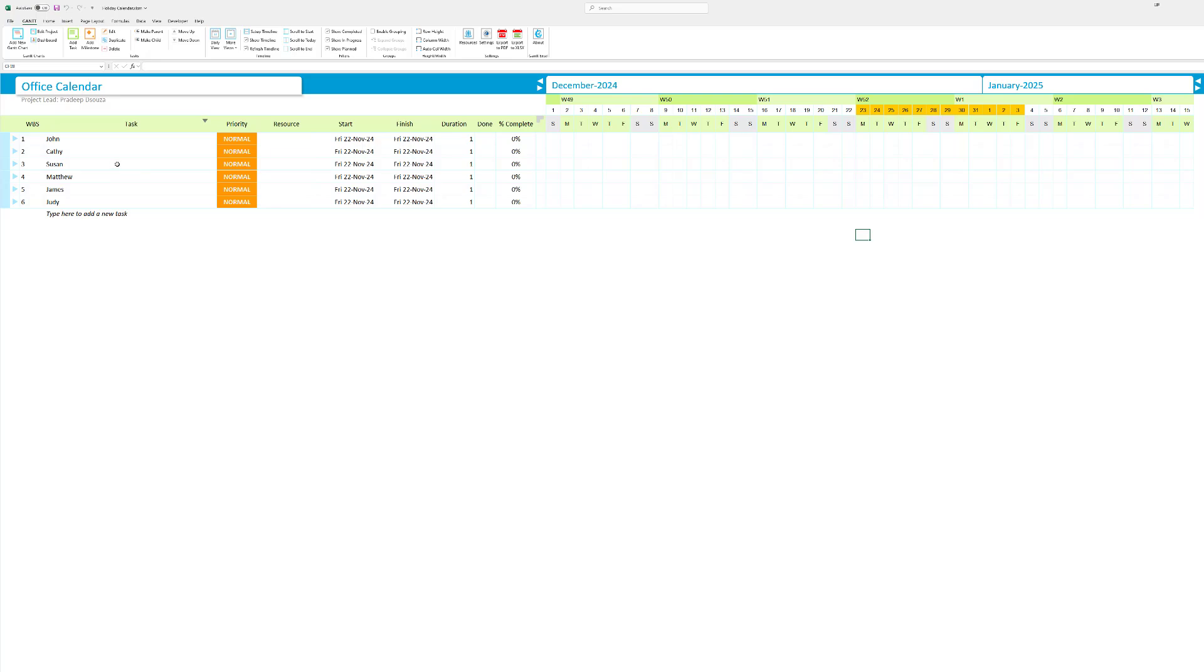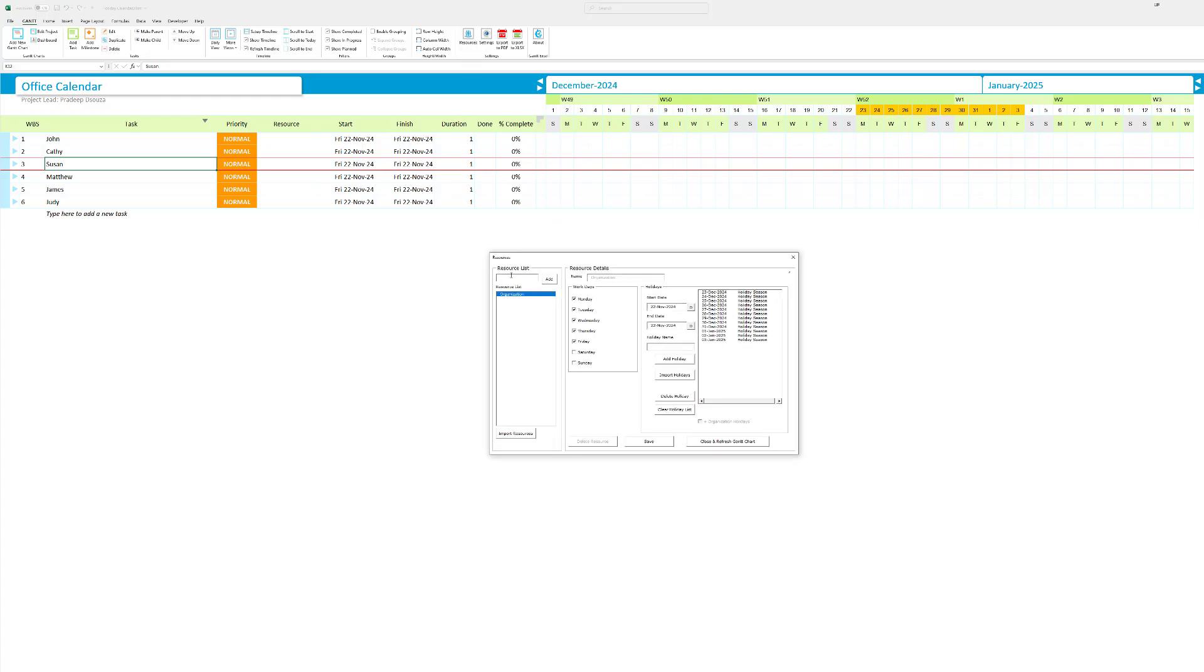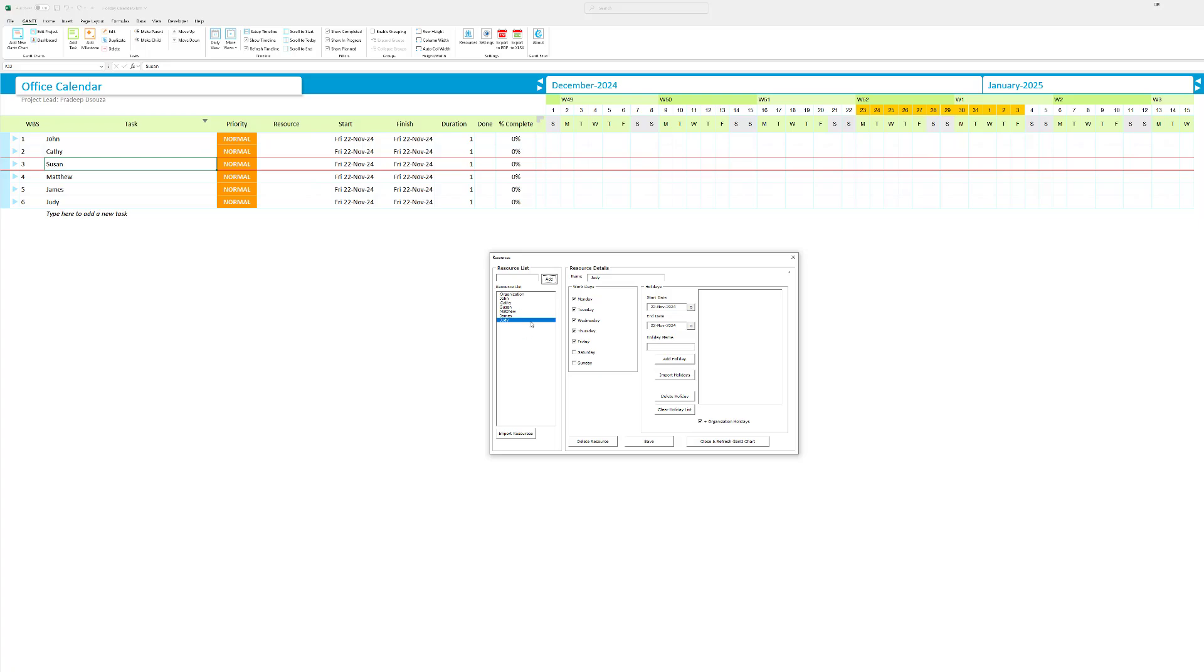Now let's add resource wise holidays. To do that I'm going to go to resources again and I'm going to add in all the resources. So I'm adding all the resources. What I can do from here is I can actually go ahead and do each resource and set their work days. I can set their holidays.